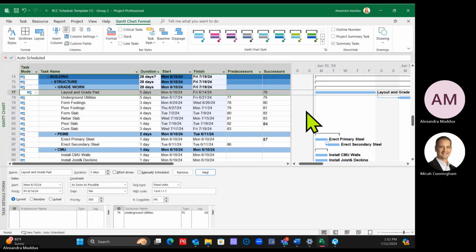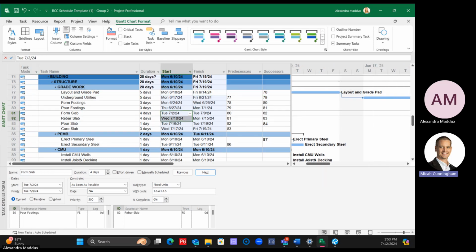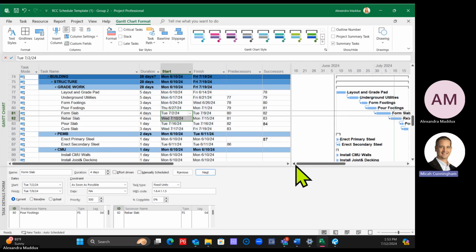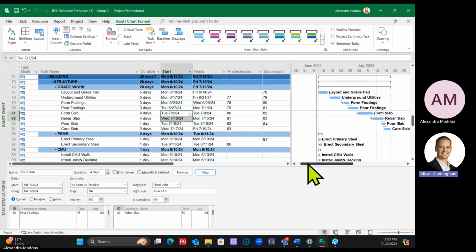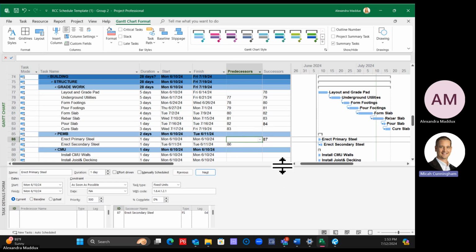So, all right. You can drag out a duration like this. The only thing here is you have to be careful because this wants to be like 6.5 days. You could do half days with this. So just be careful if you do drag out a bar to change a duration that you're not doing a half day. Does that make sense? Okay. All right, any other questions on that? Okay.